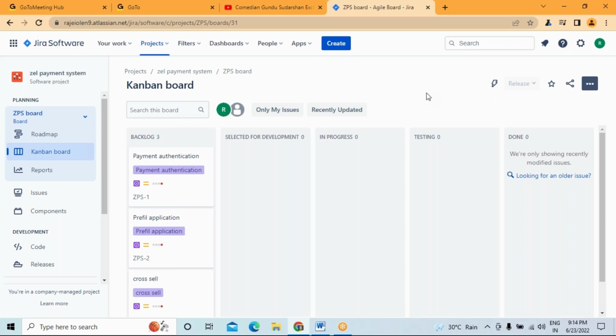Understood? Clear? But in the development team, there will be different people who define the other roles. They themselves will define all that, right? Because one will be from the business side, one will be a developer, one will be testing, and so on. What is the limit on the size of one development team? Generally in a Scrum team, 7 to 8 people are suggested, and altogether around 9 to 10 members. Even in Kanban mode we'll see the same.